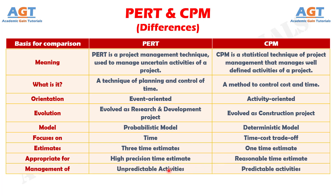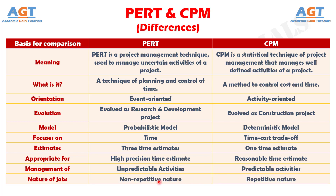Number 9: PERT deals with unpredictable activities, but CPM deals with predictable activities. Number 10: PERT is used where the nature of the job is non-repetitive, whereas CPM involves the job of repetitive nature.